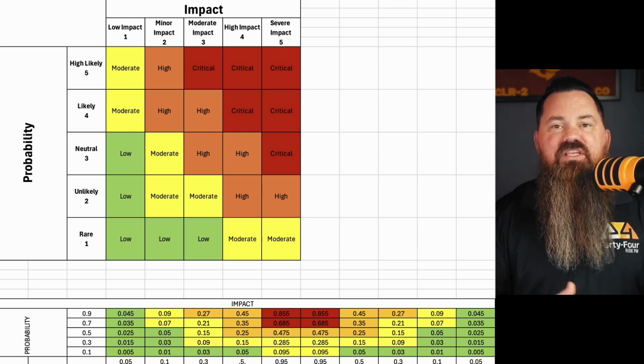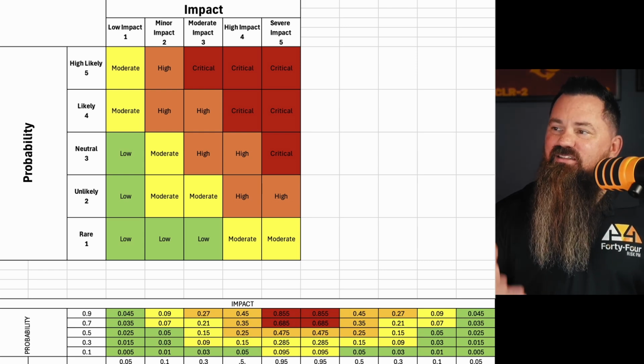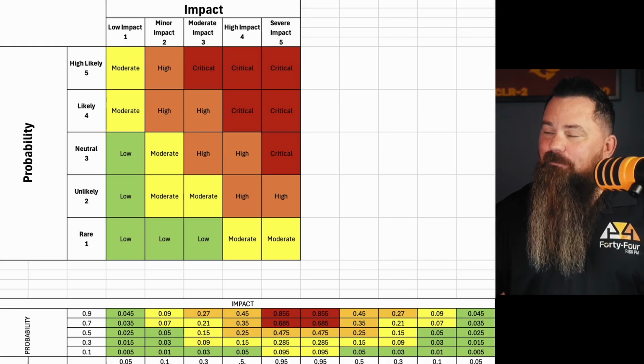I'm sure you've seen this tool before. Two axes, probability on one side, impact on the other. Both scored on a scale you define back in process 1, which again shows that this all interlinks. Process 1, we define how is our probability and impact matrix going to be laid out? How are we going to use this?